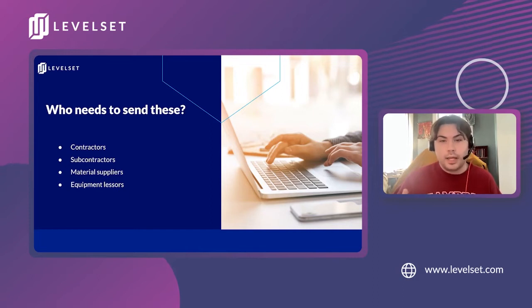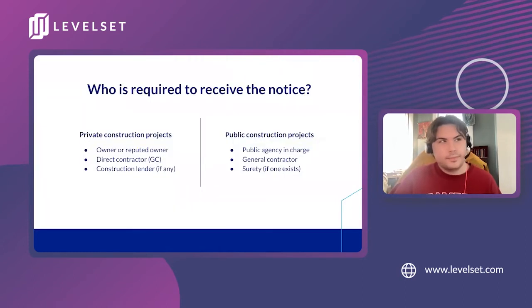One would be a pure laborer who is not required to give preliminary notice, and anyone with a direct contractual relationship with the property owner, they're only required to give preliminary notice to the construction lender if the project has a lender. So the two exceptions are laborers that are not doing any other specific roles on the project, and then if you're in a direct contract with the property owner, and if there is no lender involved. But otherwise, basically everyone does need to send this or is highly recommended to.